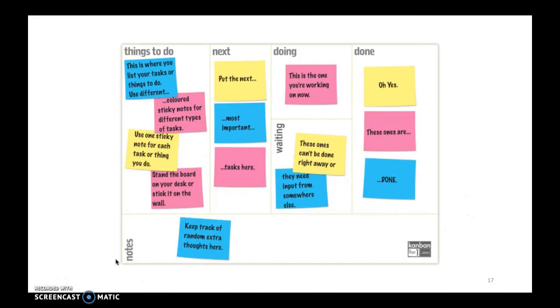As a team, he determined backlog, up next, gather requirements, design, testing, deploy, and done. He creates a board that reflects his process. Then he began adding cards to his board, each representing work either in process or coming up soon. He placed the cards in their respective lanes and asked team members to assign themselves to all cards they are currently working on. After his team has left for the day, he could easily tell the whole progress of the project, such as what has been done and what is in process.